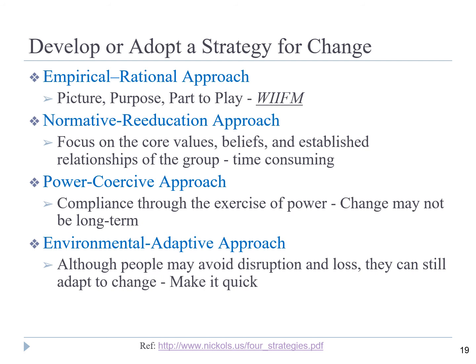So immediately we changed the focus, and I used this approach to articulate the fact that we need to identify the minimum viable product that we can put out in that same fiscal year. And again, we were able to do that by immediately focusing and changing the focus in that direction.